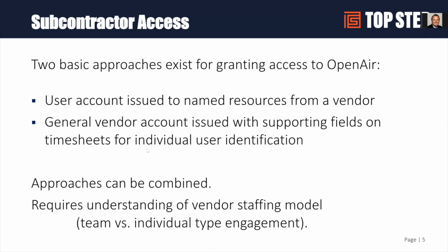It does cost additional licenses, but these people are generally working on projects and billing the same way your employees are. We've also seen where you're using subcontractors that are provided by a larger vendor, say vendor A is giving you 10 resources that you're using. You don't want to set up all 10 resources as individuals in your user account. You may set up a general vendor A as its own user and then have them log in and enter time on behalf of their subcontractors and use the notes and description fields to identify which resources are doing the work.